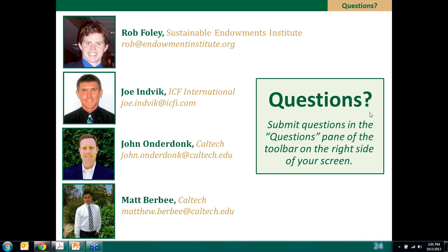Sure. Well, I was actually inspired to mention that by referencing Caltech's rolling metering plan. So we have 2 guys on the phone who are actually actively managing one of these things. But just generally, when conducting M&V, it's typically not a good idea to approach projects on a one-by-one basis. You need to ensure that the meters are there, because the capital planning process can be extraordinarily long. I mean, it can take 3, 4, 5 years of discussing a project before it finally gets implemented. It typically isn't a very nimble process. So having a rolling metering plan that goes alongside your capital plan and also alongside maybe your 5-year plan for your green revolving fund can be a very useful tool. But I'll let Matt and John cover that in more detail.